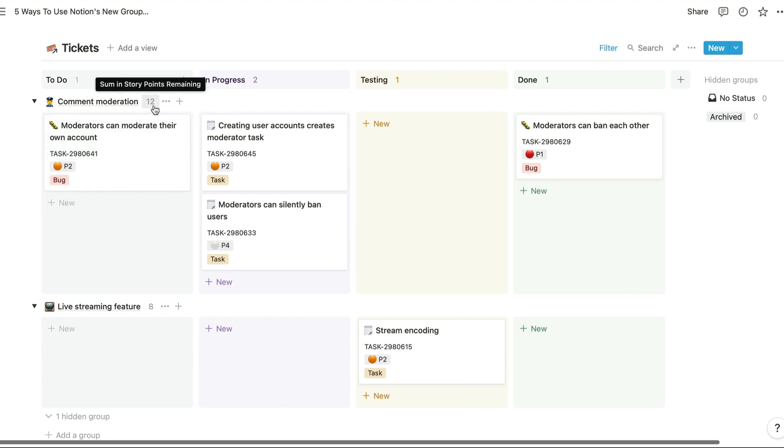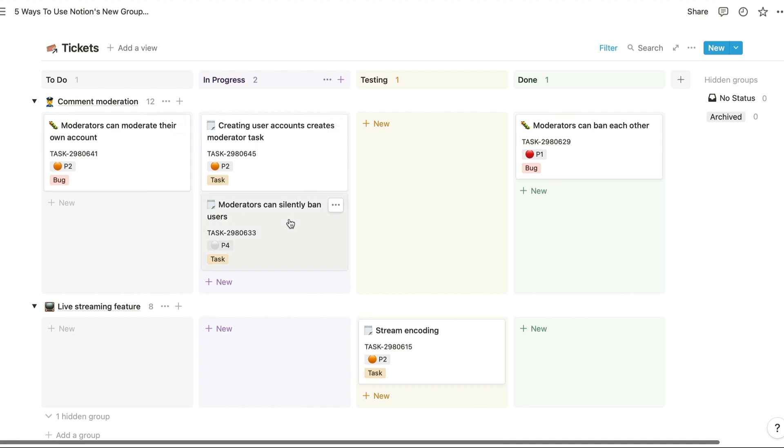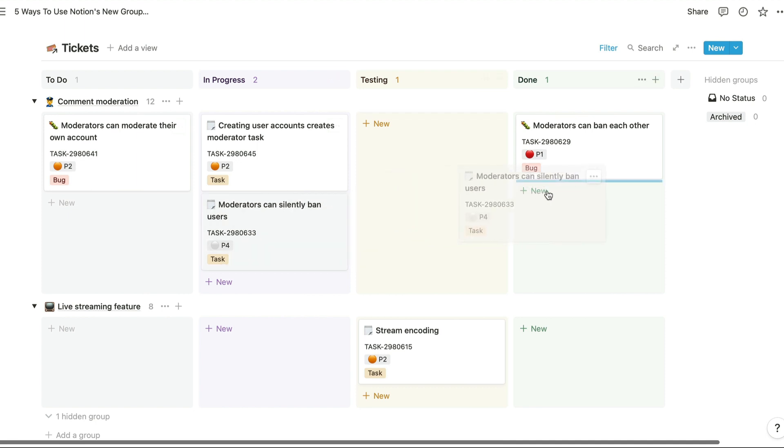So for example, developers will often use story points to estimate how long each ticket will take to complete, and the 12 next to the comment moderation EPIC shows that the open tickets for that feature represent 12 story points. That figure's based on our story points remaining formula property, so when a ticket is moved to the done column, then that number is going to decrease, and that's now come down to 7.